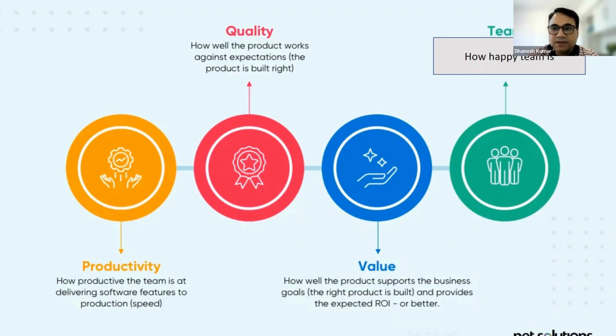A quick insight on that: if a metric is making you feel good about something, more often than not, that's just a vanity metric. If a metric is giving you an insight, one you can take into consideration and put some action around, if you can have data-driven decisions made based on it, those are the value metrics. So we have to be really careful that we choose the value metrics and the indicators that are going to be leading. It's not that lagging indicators are not required, both are required. But our focus has to be more on value metrics and leading indicators than on the feel-good factors of vanity metrics and lagging indicators.